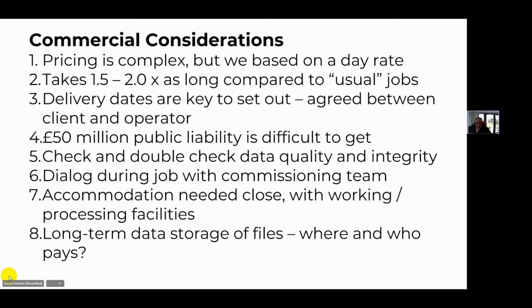We based it on a day rate, but we knew that this piece of work would take typically 1.5 to 2 times longer than our usual jobs, because of waiting around as well. Delivery dates need to be really firmly agreed between the capture partner and the client as well. You may find, as we did, that £50 million public liability is difficult to get as a drone operator. You've got to really hunt around for that as well.